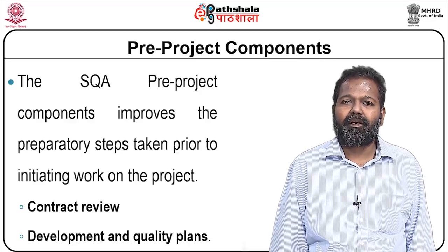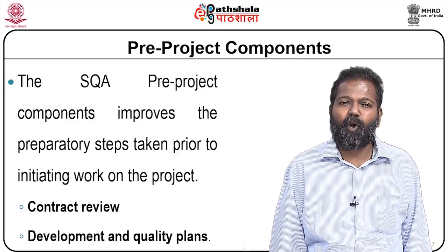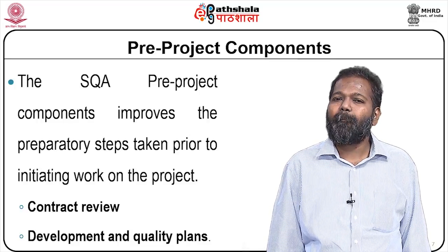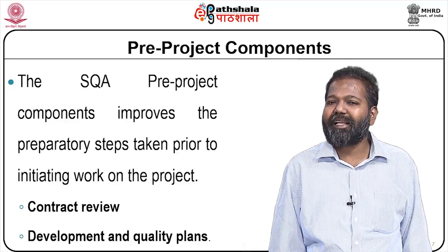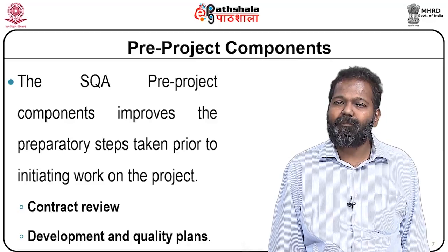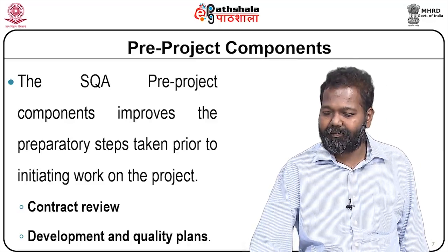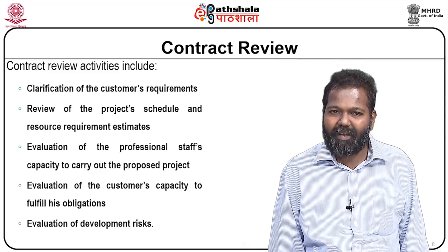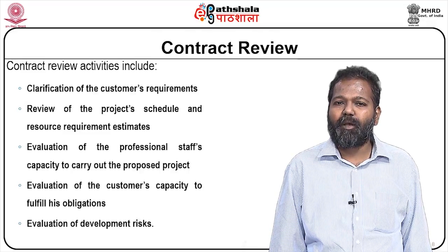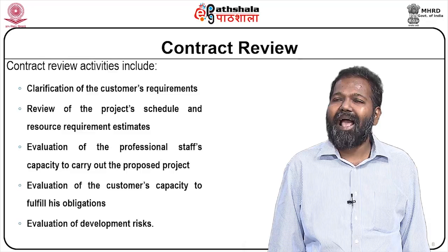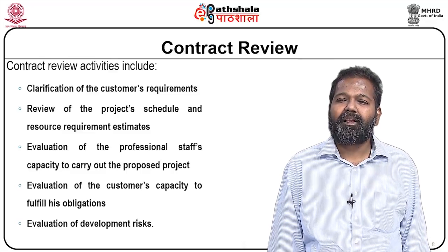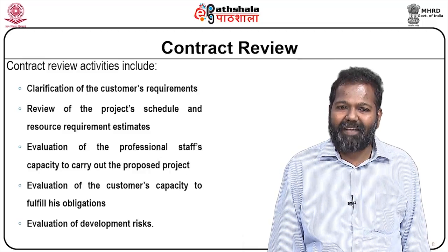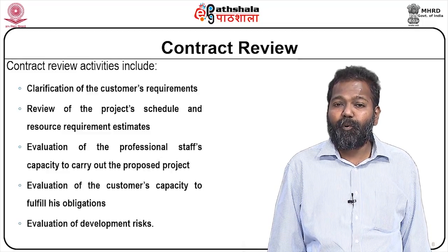Pre-project components. The software quality assurance pre-project components improve the preparatory steps taken prior to initiating work on the project. Contract review, development and quality plans. Contract review activities include clarification of the customer's requirements, review of the project's schedule and resource requirement estimates, evaluation of the professional staff's capacity to carry out the proposed project.